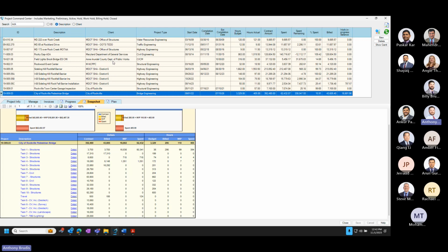Why that's being brought up in an invoicing discussion is that it makes Angie's job considerably more difficult to process internally, because even though the job isn't over budget, our system doesn't allow us to bill different phases over budget like that. So we have to play with how that invoice gets internally processed. And over time, the more you do that, the more difficult it is. It just ends up causing more problems than are necessary, and the whole thing can be avoided.